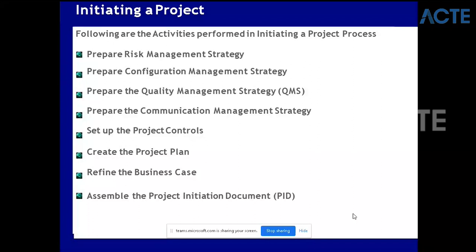Set up a project control - project control is part of directing the project. How you will control the project - the project manager will say that he needs updates every three days, monitor how much has been delivered, what cost has been incurred, and so on. You cannot just go and say you want to buy a product - that also has to go through the control. They will see the budget and approve or not approve, also known as CAB - Change Advisory Board.